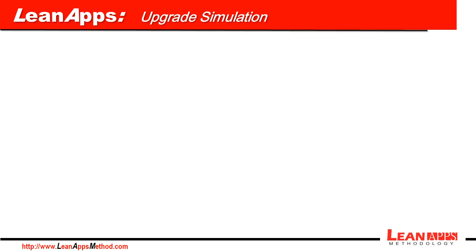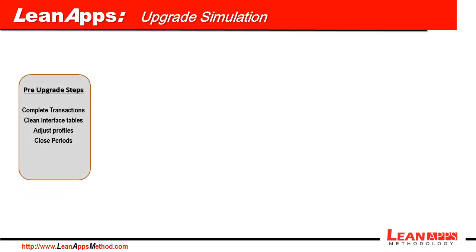Once everything's set as supposed, we need to test the new version over and over again to make sure there is no bug that could impact the daily operation. Upgrading to a version that is not stable yet could mean longer periods of tests. In the last simulation, we need to time each step executed in the pre-upgrade, in the technical upgrade, and in the post-upgrade steps to plan for production.